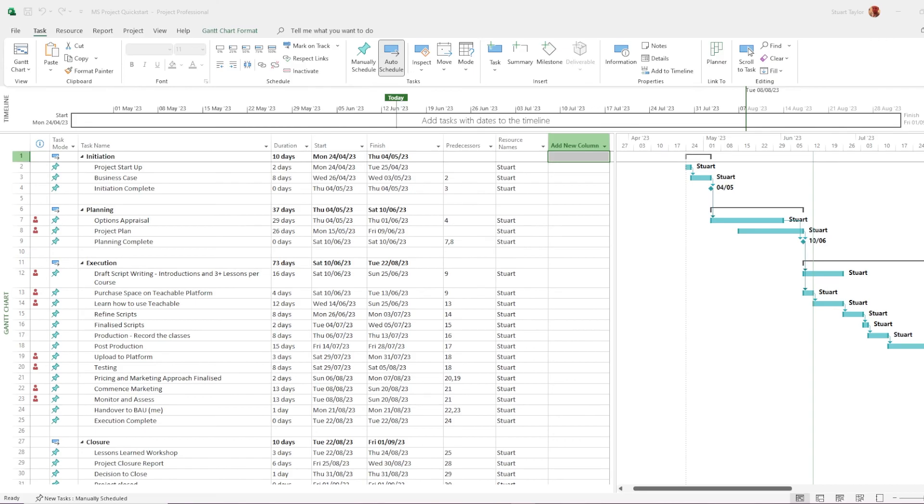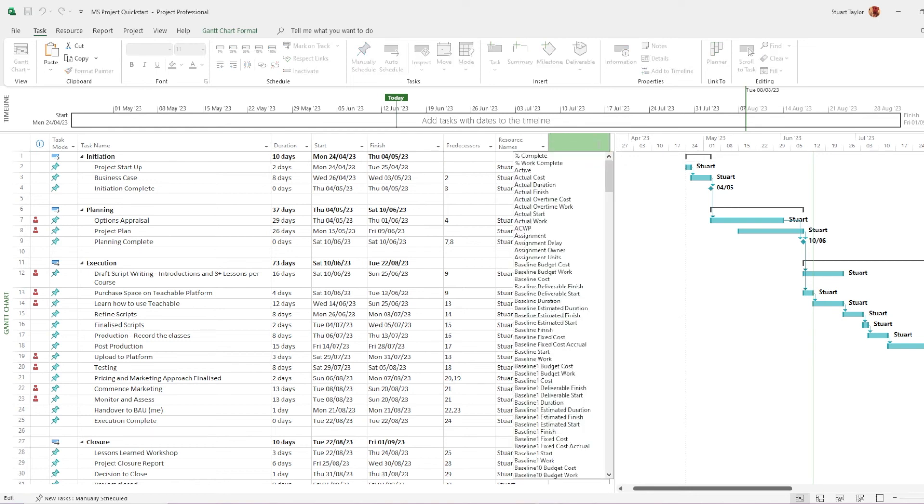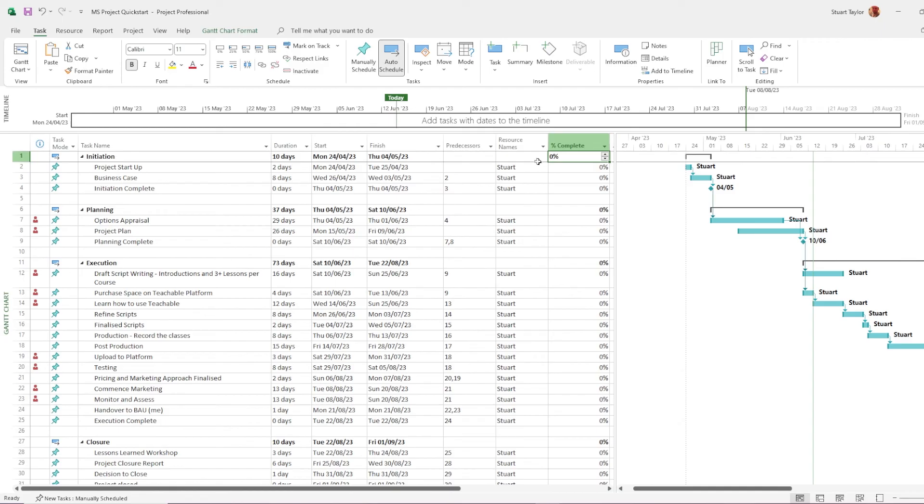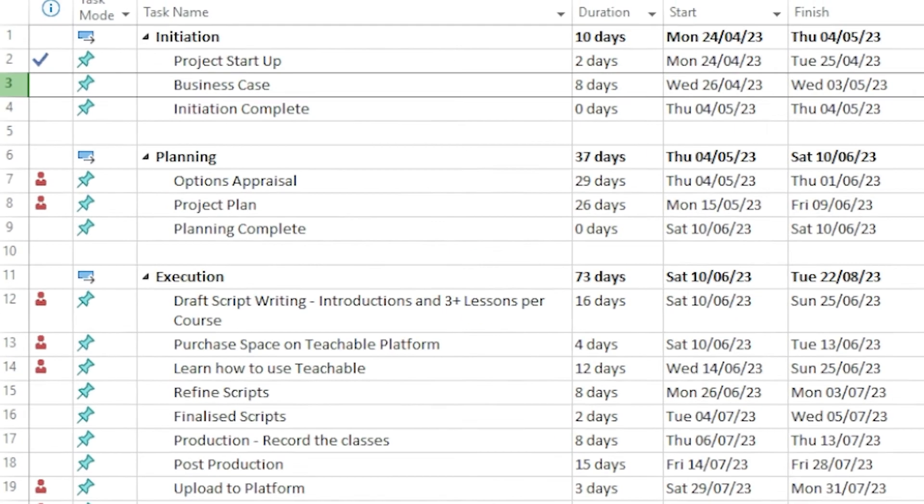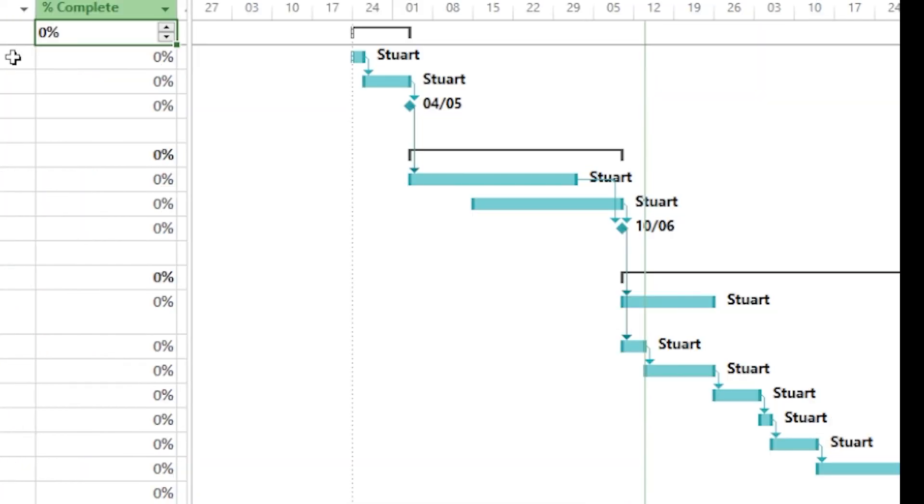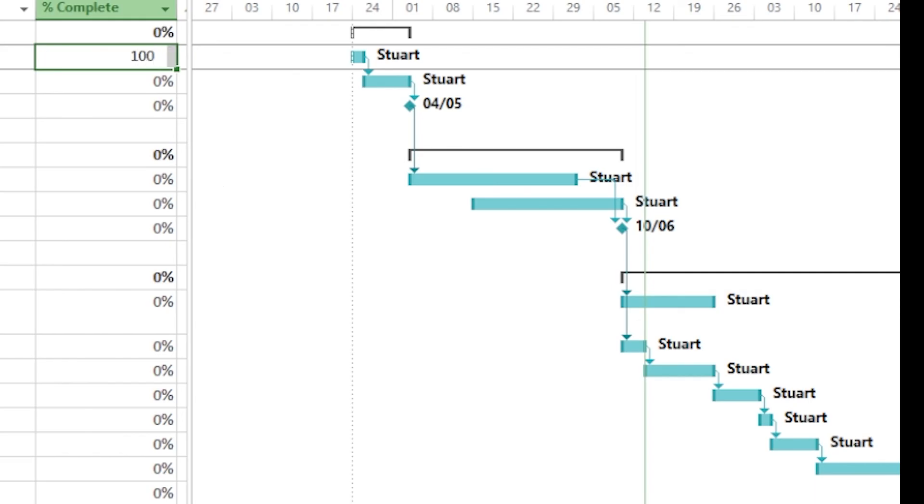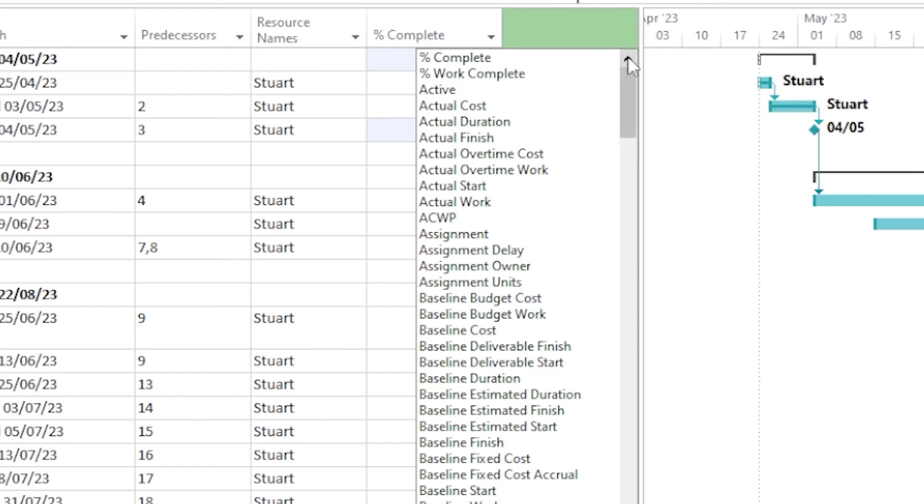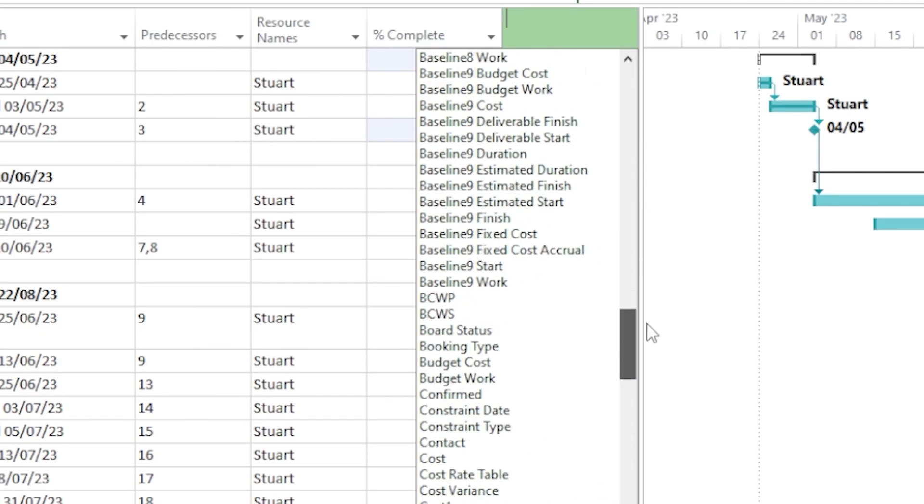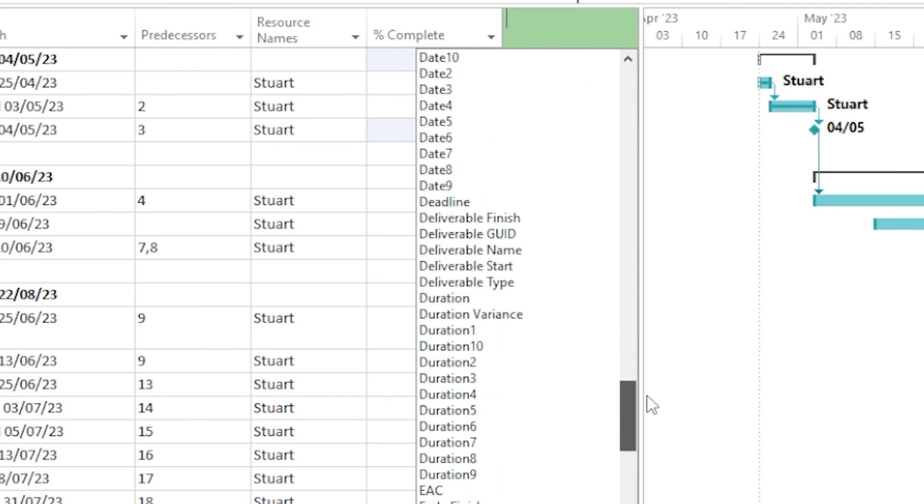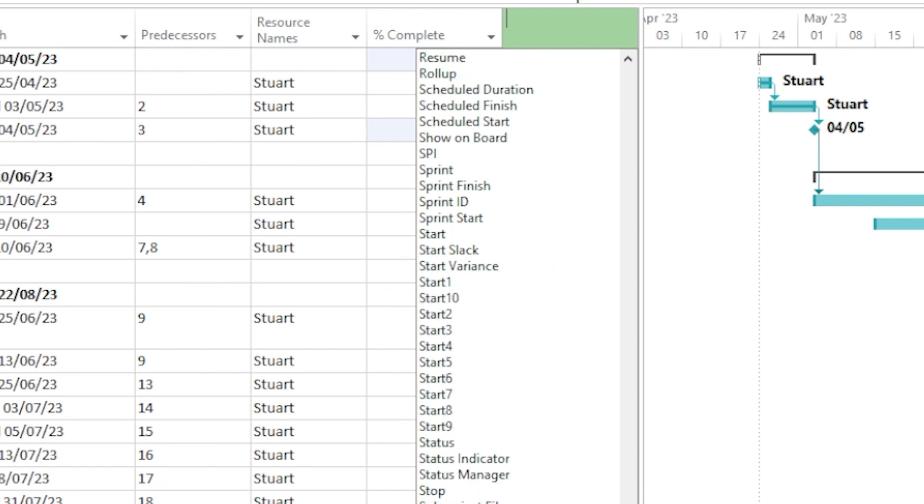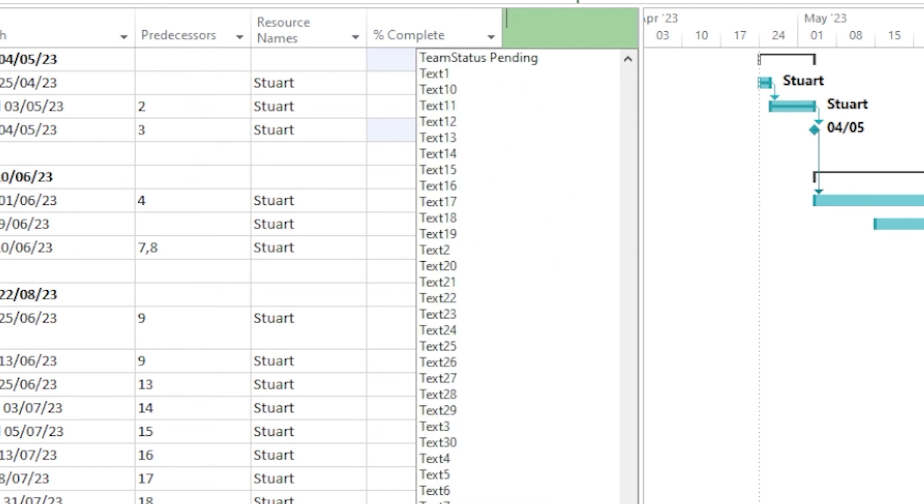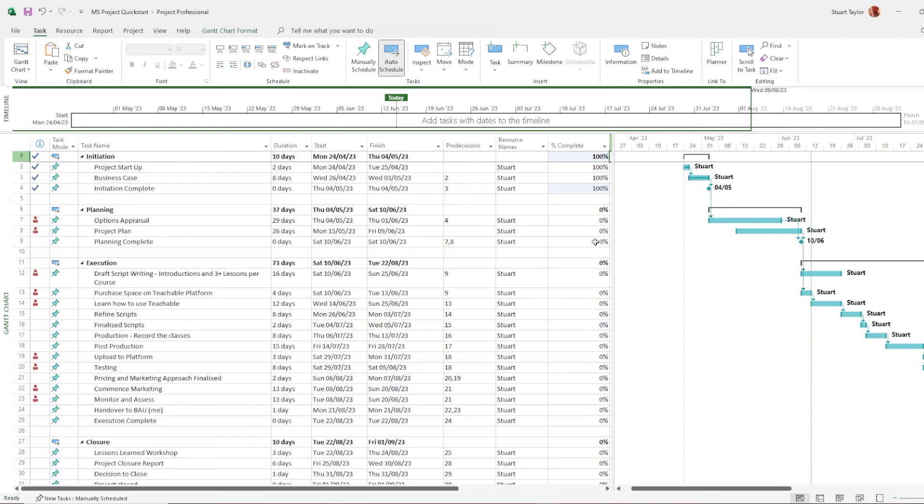One of the things you'll want to do with this is to show your progress. To do this, we go as far across to the right of the columns as we can until we find add new column. From there we click on it and select percent complete. I've completed a number of the tasks on this plan, so I'm marking them all off as 100%. You'll see ticks are appearing over on the left hand side of the page to indicate that the task is complete and you'll also notice over on the right hand side in the Gantt chart that there is a darker line going through the task line to indicate the level of completeness. By the way, if you're curious, you might have noticed when I selected the column that there are a lot of other options on there. There are so many things you can choose from here.